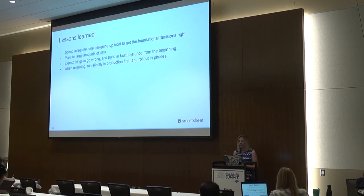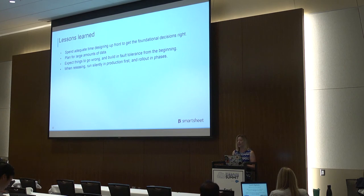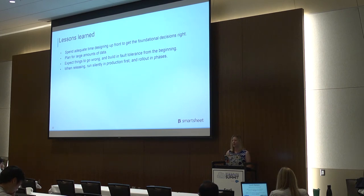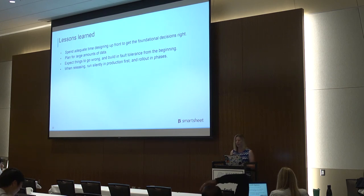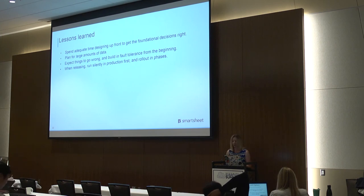In closing, there were a few key things in this project that really saved us. We spent a lot of time up front investigating technology decisions, designing and discussing with others on the team, and getting buy-in for our decisions — I think if we had forged ahead with the first suggestions, we would have struggled a lot more. A lesson learned was to plan for more data than you ever think possible, and expect the worst possible scenarios and the ability to recover from them. Being able to release in phases, verifying metrics on each increment, helped us roll out to production confidently.